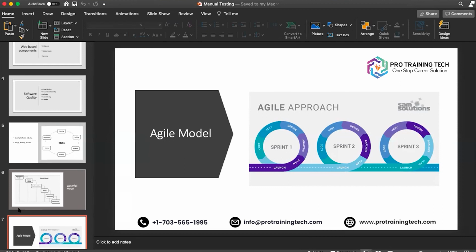Okay, I'm not going to go that much farther, but I did mention the main meetings involved in this method. The sprint planning meeting is usually where they decide what's going to happen. There is a daily stand-up meeting, which the Scrum Master usually holds, where the team gives updates and says what they did yesterday, what they're doing today, and if they're having any issues. And then, last but not least, there is a retrospective meeting, which is also conducted by the